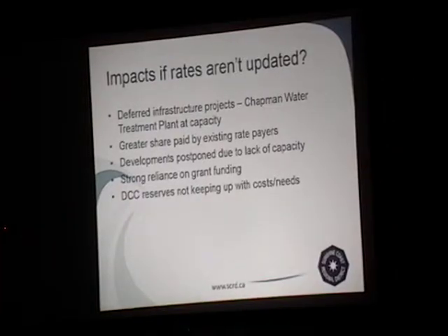Okay, and I just put this slide in just to show what would happen if the rates aren't updated. Essentially, we wouldn't accumulate the funds in order to do the expansion projects. So projects would have to be deferred. A good example is the Chapman Water Treatment Plant, which is already at capacity. We're hoping to buy capacity through conservation measures like metering.